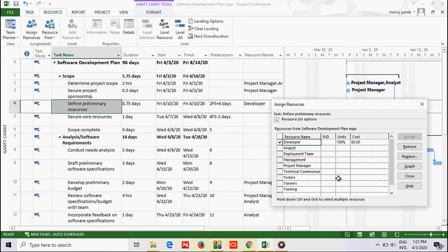Student, we have seen there is a third resource called a cost resource. We created one resource named Traveling as a cost resource. When we assign this resource to the activity, we get access to enter a cost. Because this is an overhead expense, you cannot set it in the resource master. It depends on the nature of the activity and the duration of the activity.